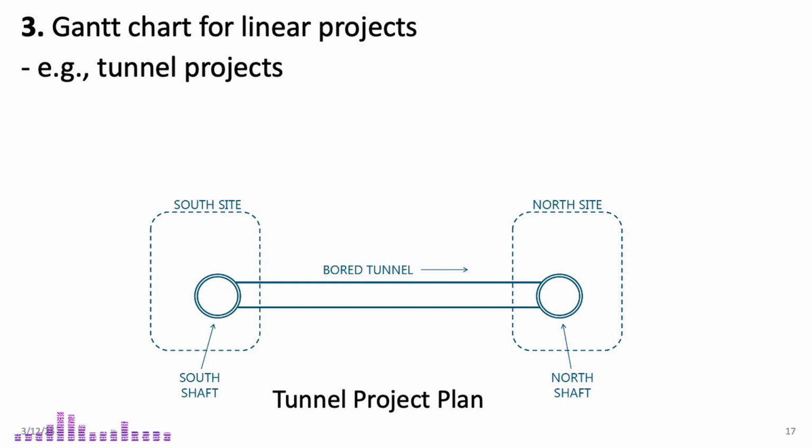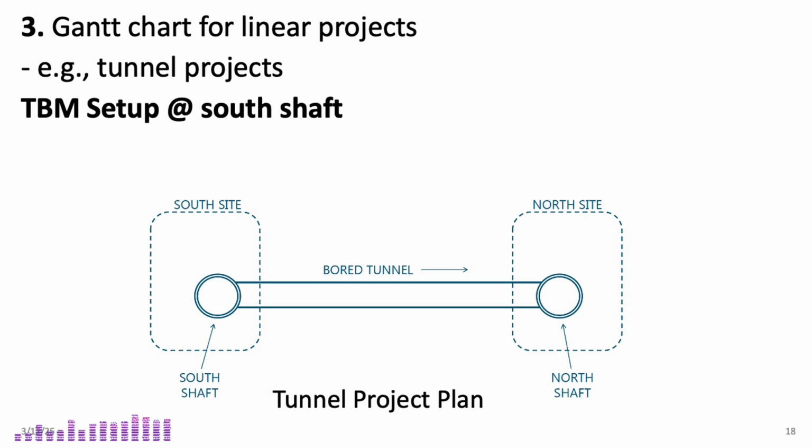As you just saw in the clip, constructing a tunnel using a tunnel boring machine, TBM, follows a series of key steps, and some of them require repetitive activities. First, we have TBM setup and launch. The TBM is transported in parts and assembled on-site at the entry shaft or portal. Once fully set up, it starts boring into the ground.